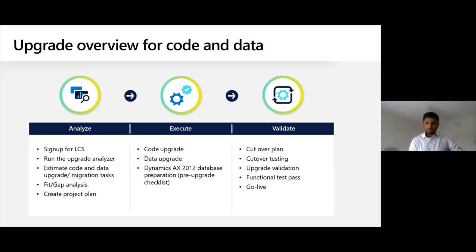Expect issues during data upgrade, but resolve all the data upgrade issues in your dev environment before starting the data upgrade in your sandbox. Perform a couple of rounds of data upgrade steps in your sandbox environment before you move into the validate phase of the project. In the validate phase, you will create a cutover plan, then test the plan, validate your upgrade, and finally, you will go through the go live activities and make your application live in D365.